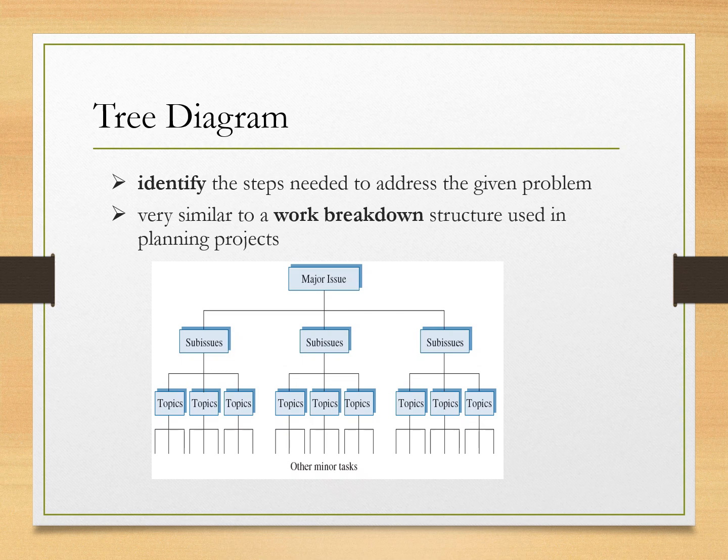Big goals can feel overwhelming. Improving customer satisfaction sounds great, but where do we even start? The tree diagram forces us to break that down into actionable steps. Maybe improving customer satisfaction requires better products, better service, or better communication. Okay, what does better service require? Maybe faster response times, better training, and more. And that's the power of the tree diagram.